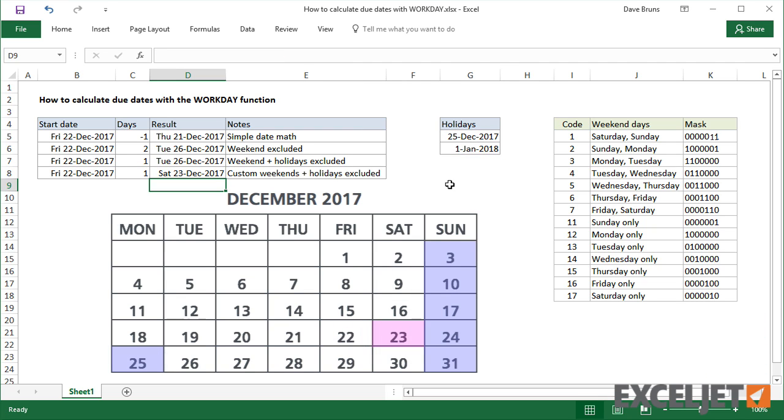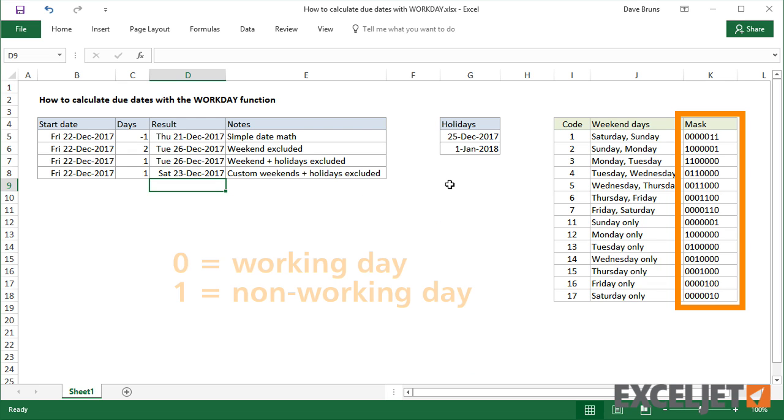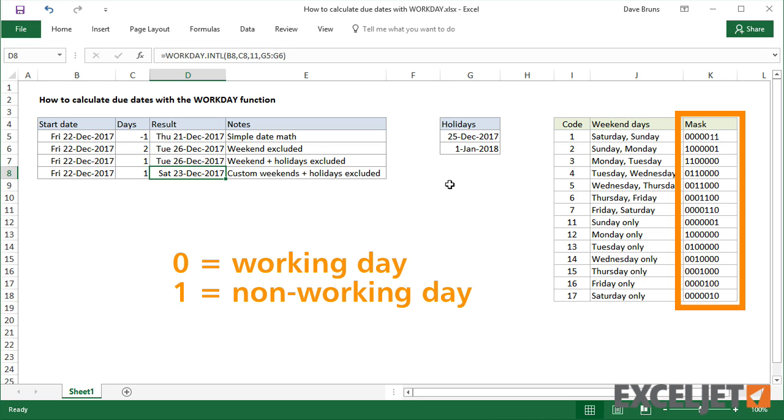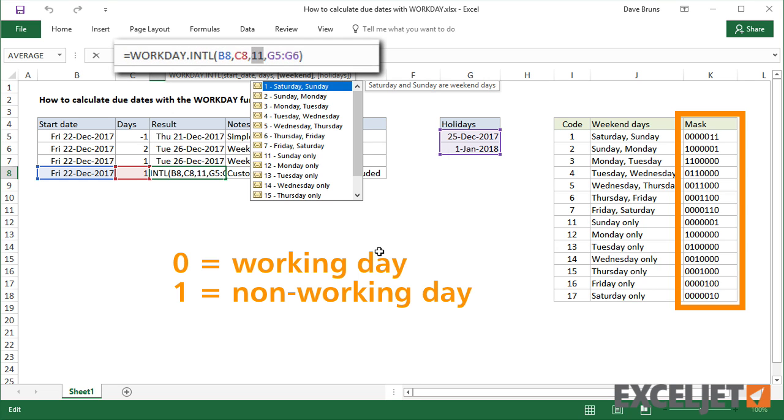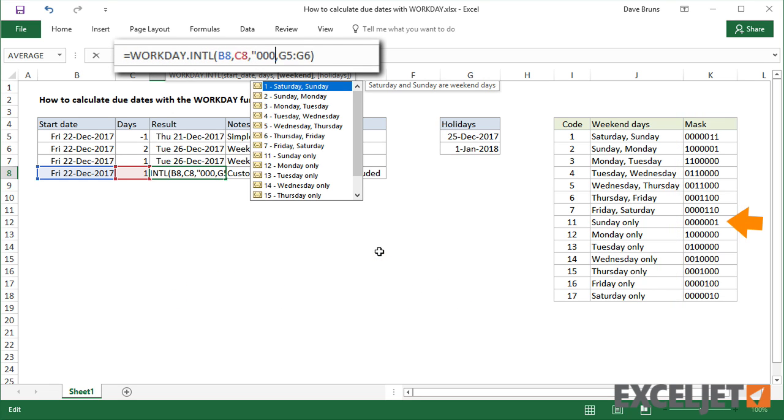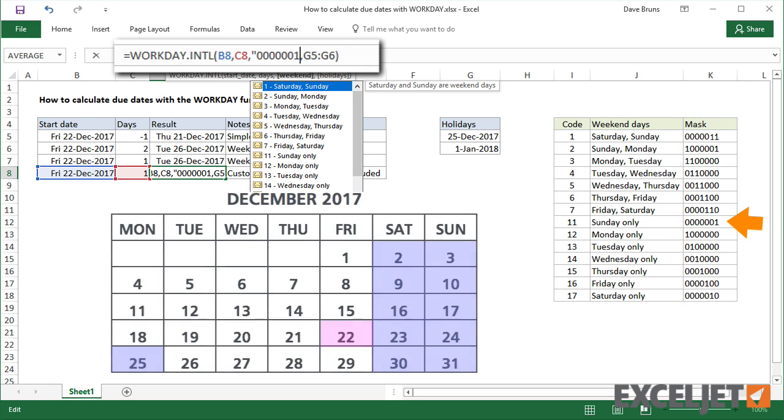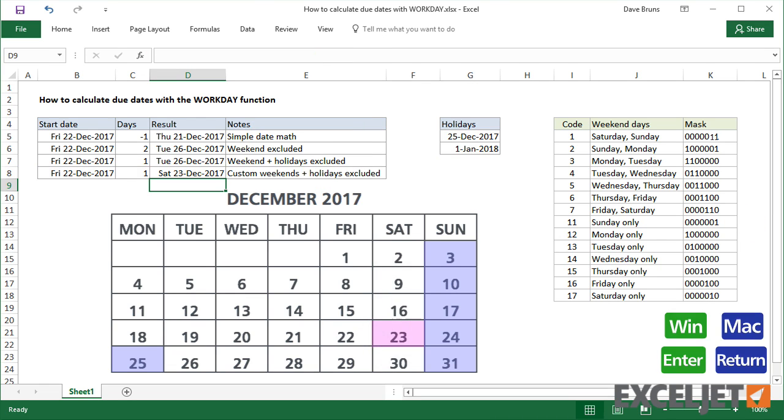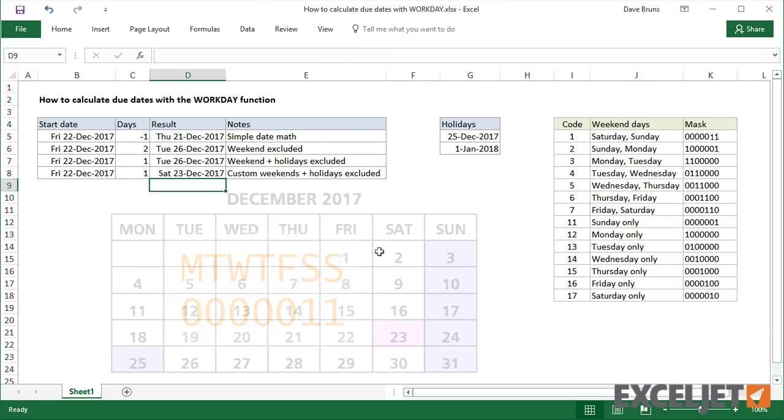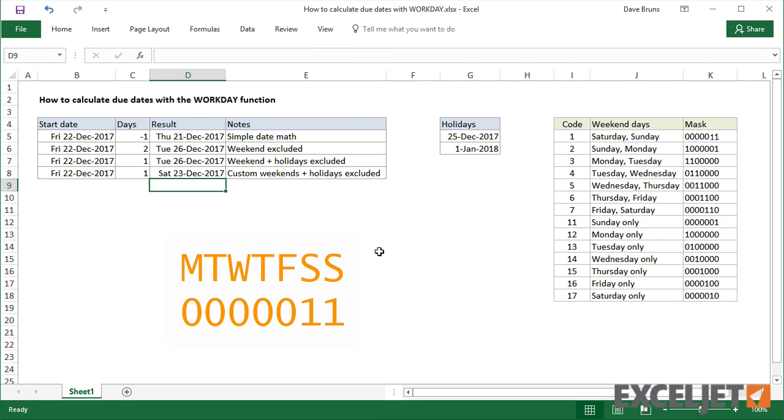A more flexible way to customize weekends is to use a special mask based on a text string of 7 1s and 0s, where 1s represent non-working days in a week that begins on Monday. So, for example, if Saturdays are normally a working day, I would use 6 0s followed by a 1. This scheme lets you specify any combination of working and non-working days in a 7-day week.